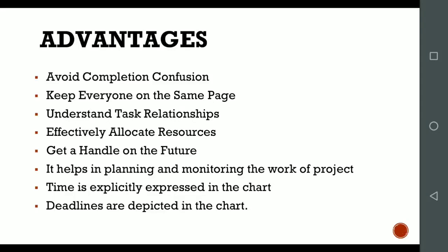Evaluation will follow the pre-test task, but for the post-test we have to prepare the question paper. For that we don't have to wait for the completion of the task evaluation, so we can start previously. It means we can start preparing the question paper before the evaluation event, so we'll save time here.